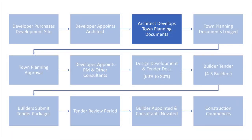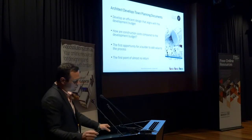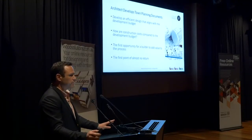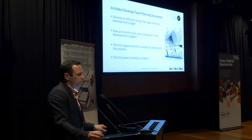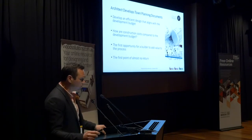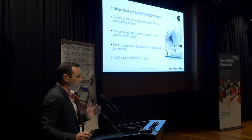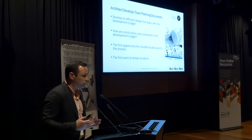The first key stage to hone in on is when the architect develops the town planning documents. The really key component here is to develop an efficient design that aligns with the development budget. Surprisingly, a lot of the time this doesn't happen. If an architect is given the sole responsibility of designing a building to a budget, I believe that's very difficult — especially in the space we're in right now, with prices escalating and resources being an issue. Quantity surveyors are struggling to hone in on how much buildings cost, over-correcting and under-correcting. So if a quantity surveyor is struggling to work out how much a building costs in the real world, how is an architect supposed to do that?